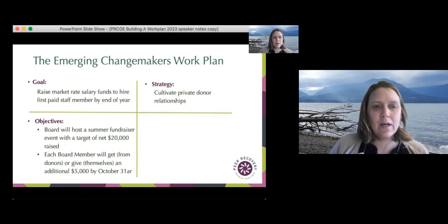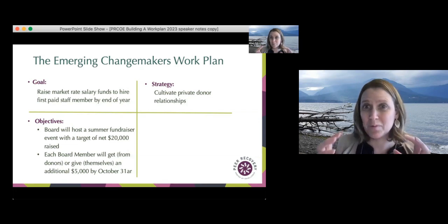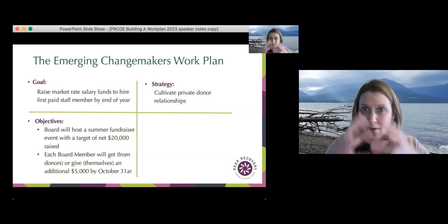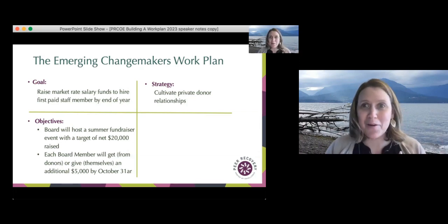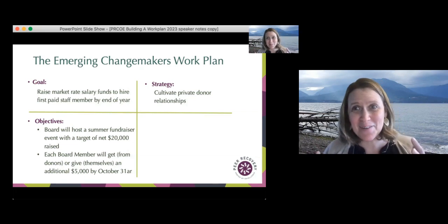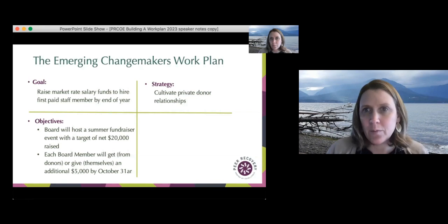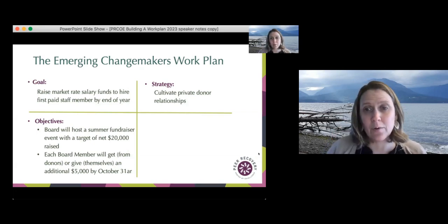And you can see here, with objectives being this measurable step to lead towards your project goal, this is very measurable. We're going to know whether we hit these objectives or not, right? We want to ensure that when we set objectives that they're reasonable. These folks seem to think that they have enough people that can attend this event that they can raise $20,000. For nonprofits that I've been a part of, that might have been a really ambitious goal. For others, that might be a very small goal. So zooming in on what's realistic, what's timely, what makes sense, and how can we see how we're on track throughout the course of our project.